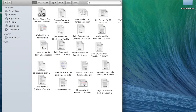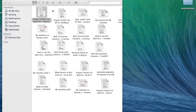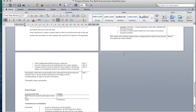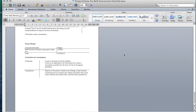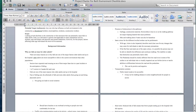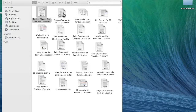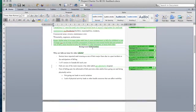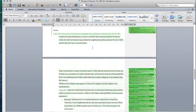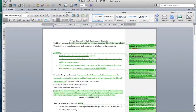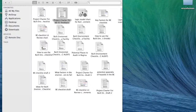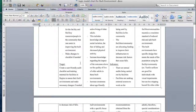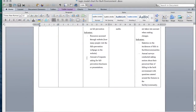So let's get started and look at some of these documents. The first thing that I created was the project charter. The project charter is a document that outlines deadlines, stakeholders, background information, and essential information as to why the project should be initiated. This was the first time that I created one and, as you can see from the comments, there was a lot that I learned about what goes into it.